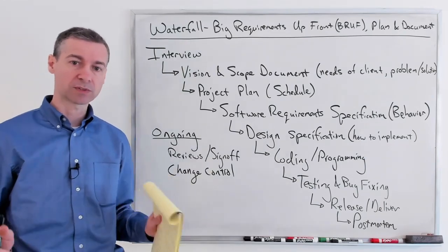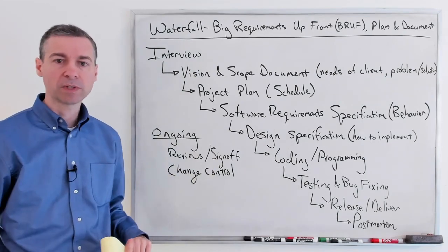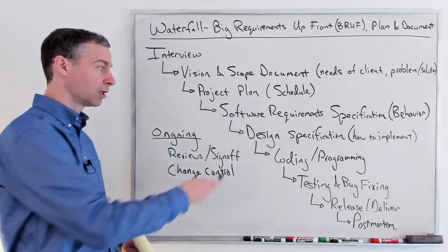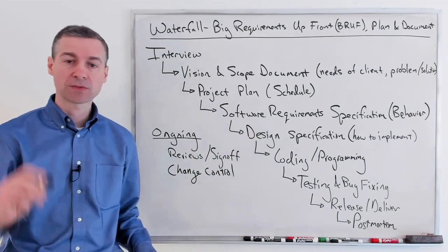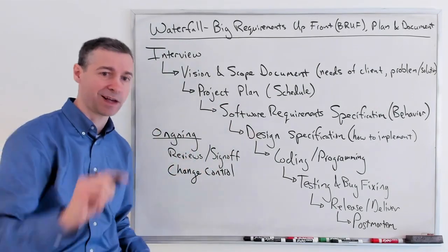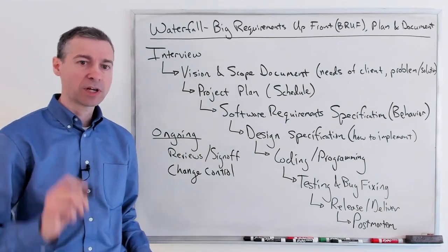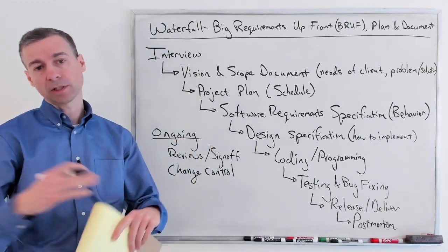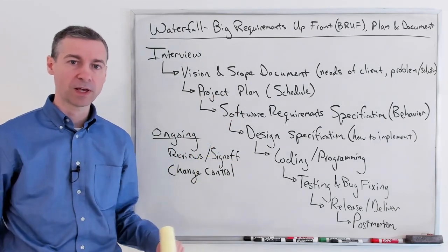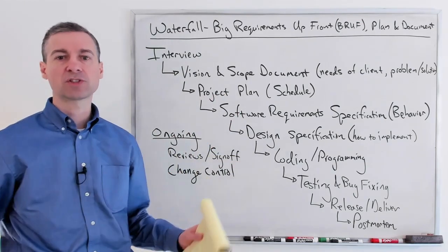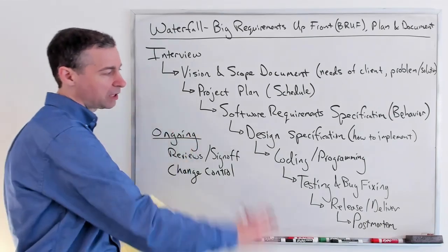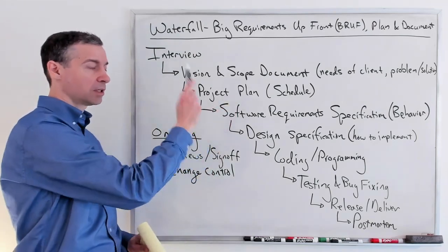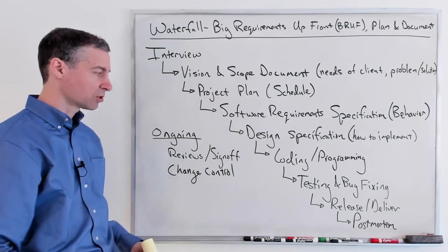Usually you have a board or a set of people, and any change to the specifications, the requirements of the system, or the design specifications, requires these people to review and sign off that they agree that this change will result in the following changes, usually a change to the schedule, or we're going to change the scope of the project or this or that. But we can't just let things change. It's all one big plan, and as you jostle it, you're going to screw up your ability to deliver it on time. And so you implement change control.